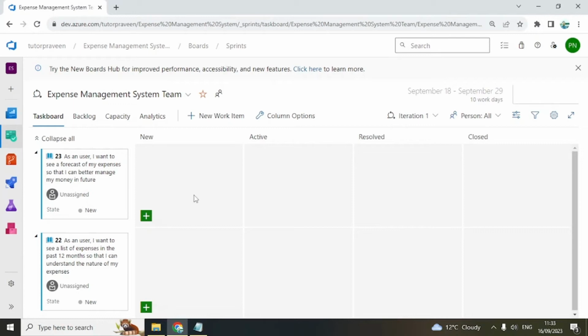But the more ideal way of calculating this is through story points, which is widely accepted across the Agile world. It is recommended that you go for story points, and using those points you calculate the velocity of your team, which will be apparent after 2 or 3 sprints. Once you know that your team's velocity is, let's say, 20 points, then in the subsequent sprints you take only 20 points of stories into your sprint. You don't take more or less.